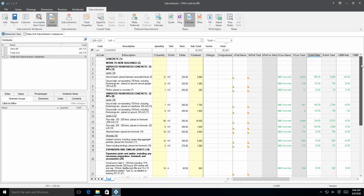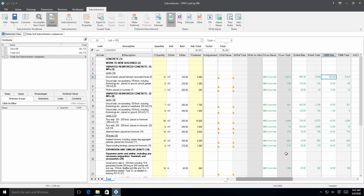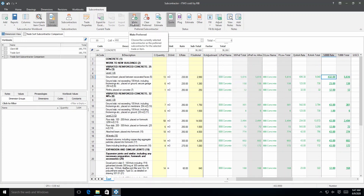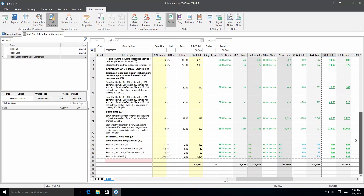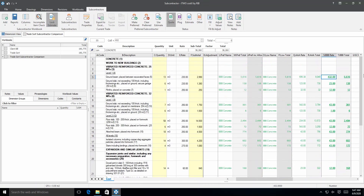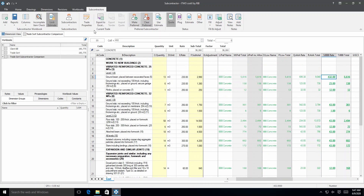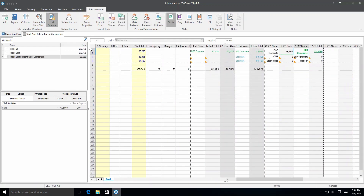The second subcontractor is the lowest overall. To select the second subcontractor as preferred, click any cell with its name or total in it to select it, then click the Make Preferred button, or right-click and choose the Make Preferred option. The preferred column will then be filled with the selected subcontractor's details for all estimate items, and their details in the subcontractor columns will be bold and underlined. The preferred selection can be deleted with the clear preferred button in the ribbon. Back on level 1, we can see the preferred details have been carried over.